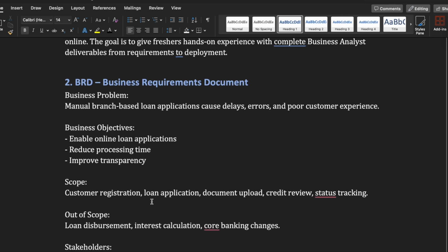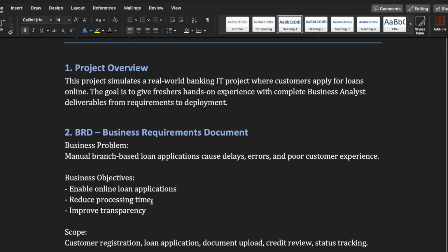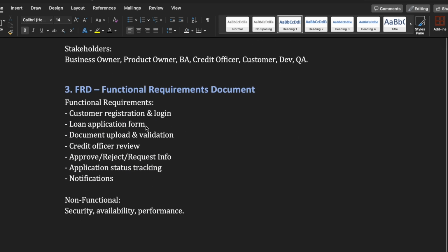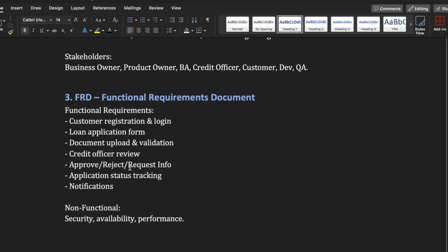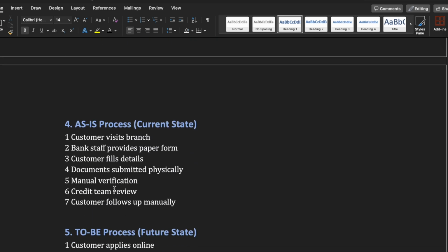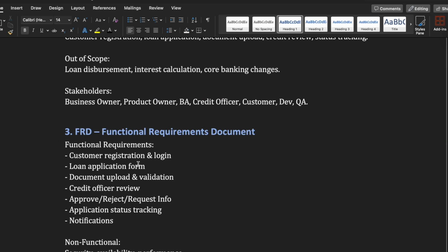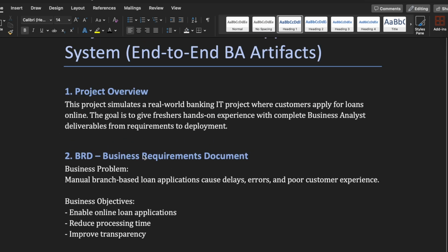In the agile environment we don't create BRDs, so you'll get something like high-level business requirements over the phone, or in a Teams meeting, or email, or a Confluence page, or intake form, or whatever you receive. From there you have to create the system requirements, you have to create an epic and user stories.